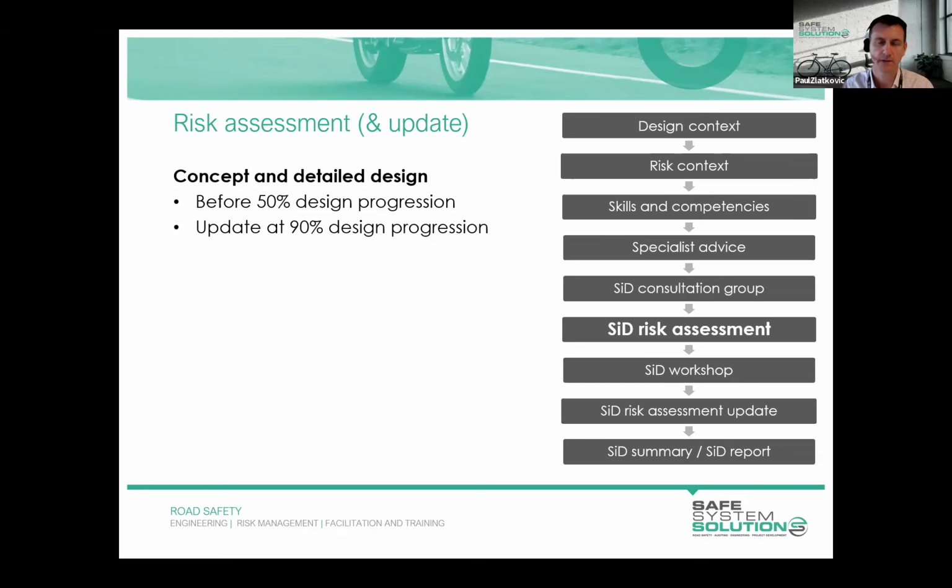It's important that we undertake this as early as possible in each of our design phases, because that gives us the greatest opportunity to identify risks, assess them, and then take any corrective action or make any changes because of the outcomes of that risk assessment. That's why a risk assessment must be completed before you reach 50% design progression. We'll cover the risk assessment process in more detail before we move into our small group exercise.